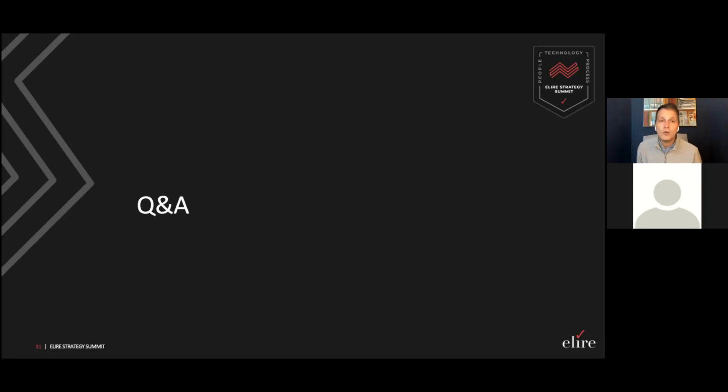The next are, what are examples of criteria for a design gate review or a test gate review? That's a great question. Testing will be covered extensively in the testing session tomorrow. So I'll focus on design. And I think there the key is, again, making sure you've got consensus amongst your stakeholders, review and sign off, really validating that design. It can't be the design of your consultant. It has to be the design that your stakeholder, your acceptable from your RACI, believes in. If your acceptable from your RACI hasn't reviewed it, then you run the risk of being off track.